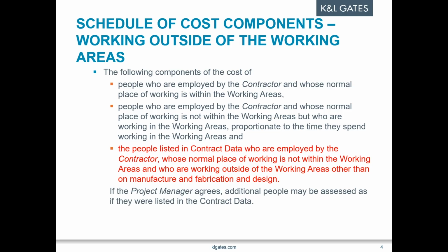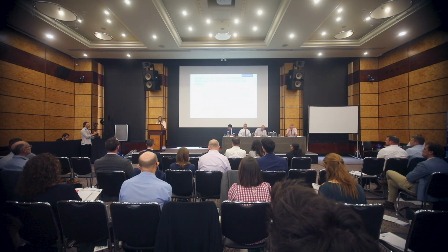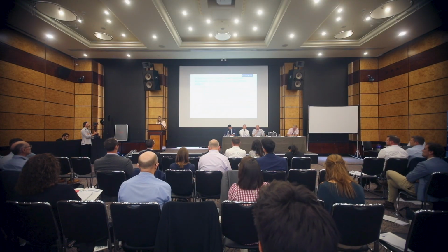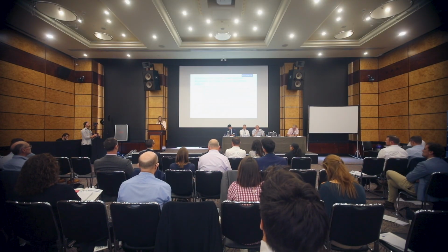So one of the amendments I want to talk to you about firstly is the update to the schedule of cost components. Whilst we might be living in a post-pandemic world, there are many things that still remain from COVID. And whilst more and more people seem to be coming back into offices and workplaces, the reality is hybrid working and flexibility on working from home seems to be here to stay. So this has now been reflected in the schedule of cost components.